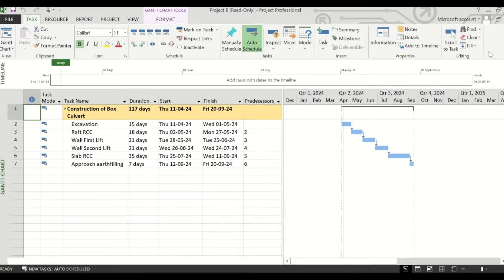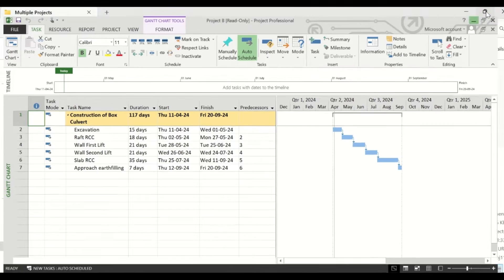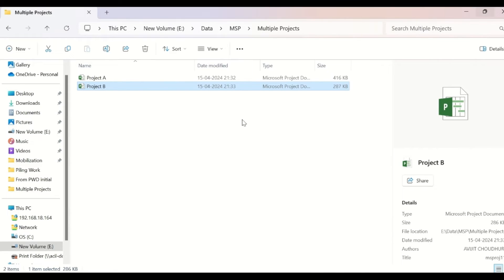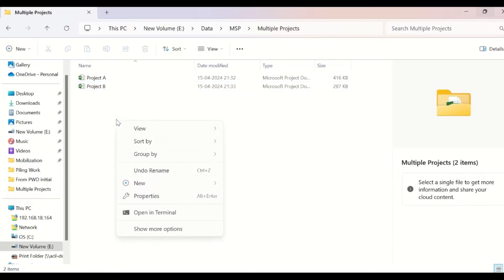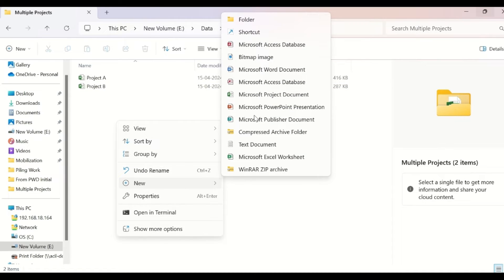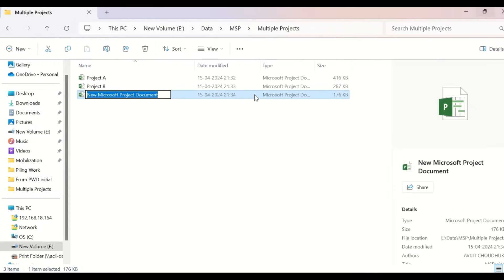For this, we will have to create a third schedule that will be the master project schedule for monitoring. Let us create the third schedule and name it as master schedule.